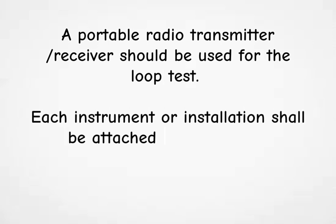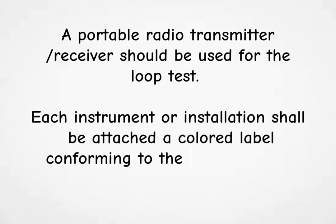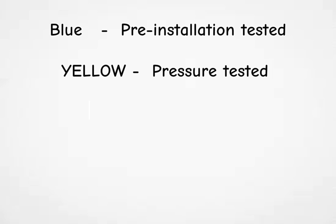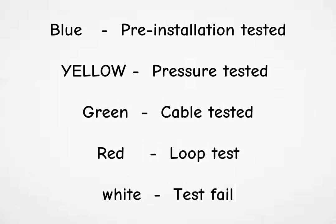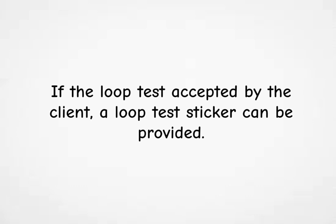Each instrument or installation shall be attached a colored label conforming to the following code: Blue — pre-installation tested; ELO — pressure tested; Green — cable tested; loop test white — test fail. If the loop test is accepted by the client, a loop test sticker can be provided.